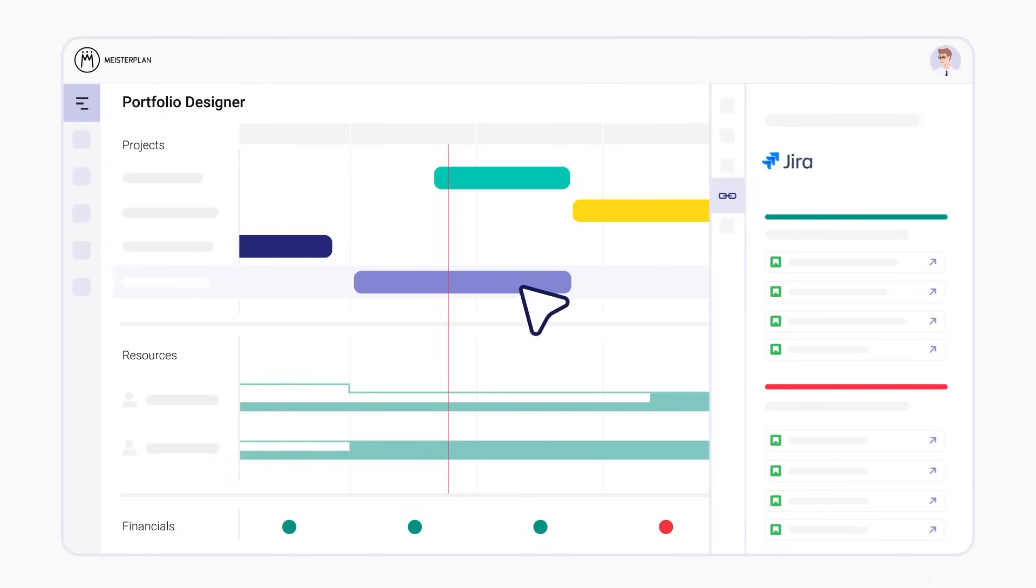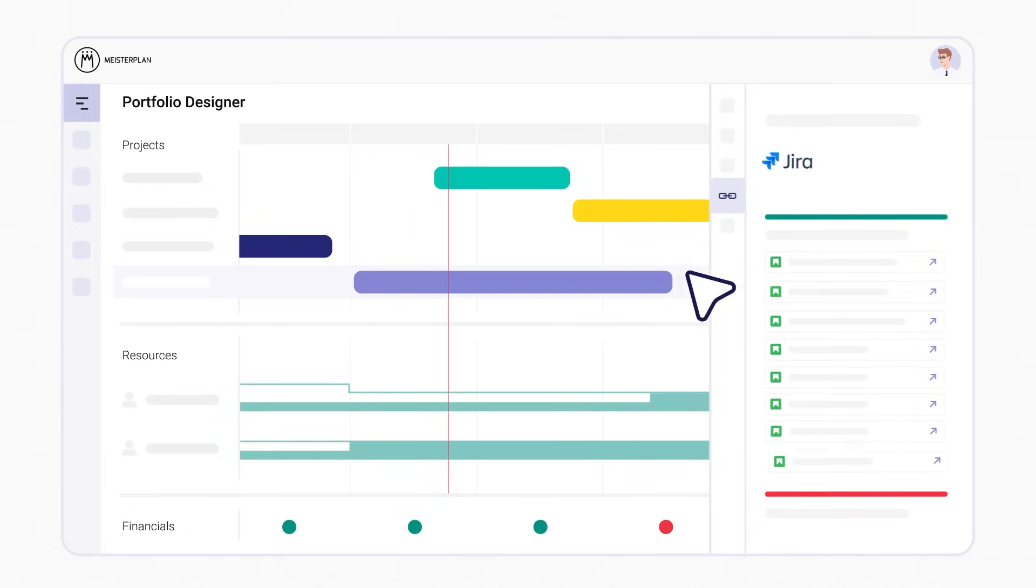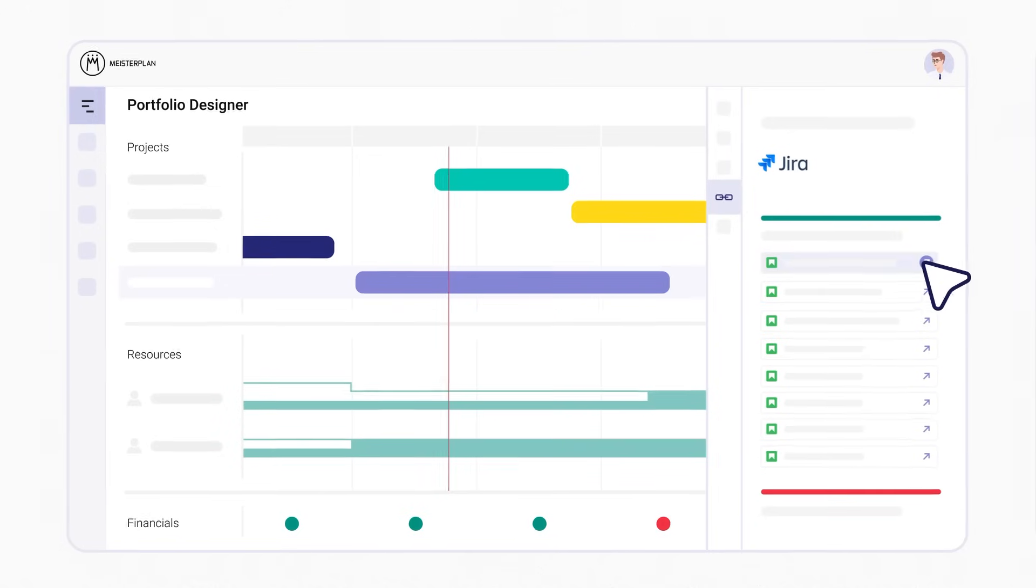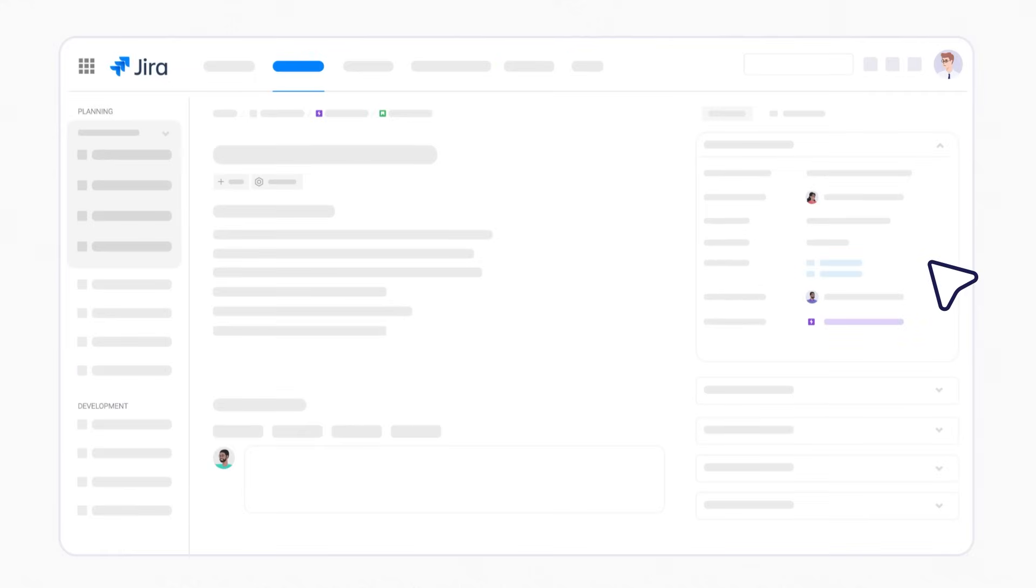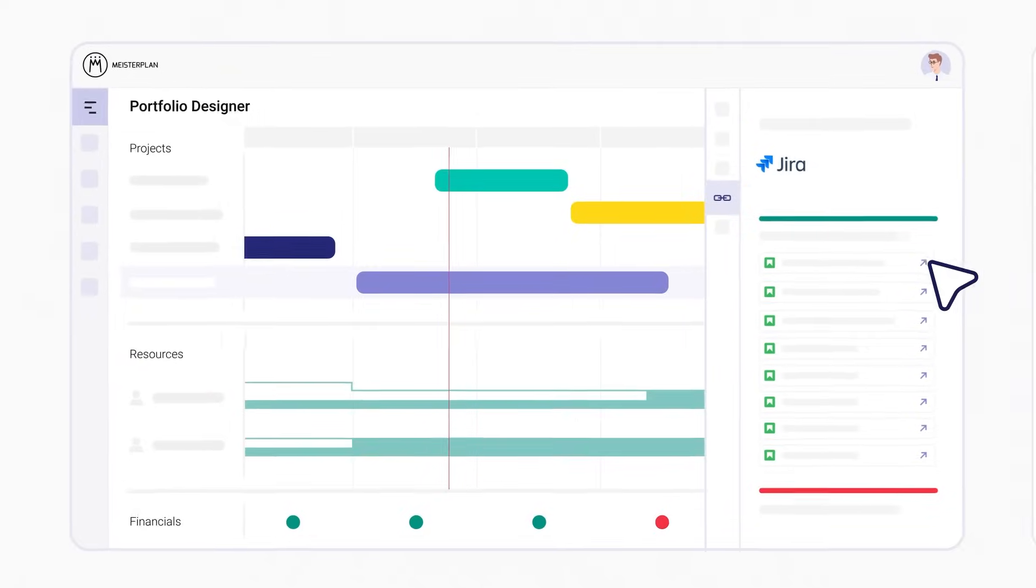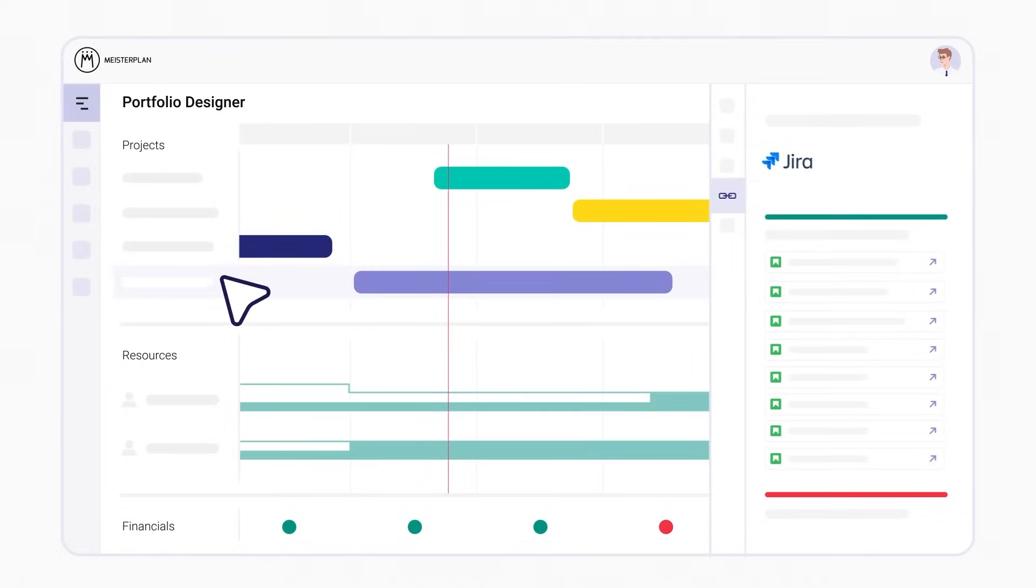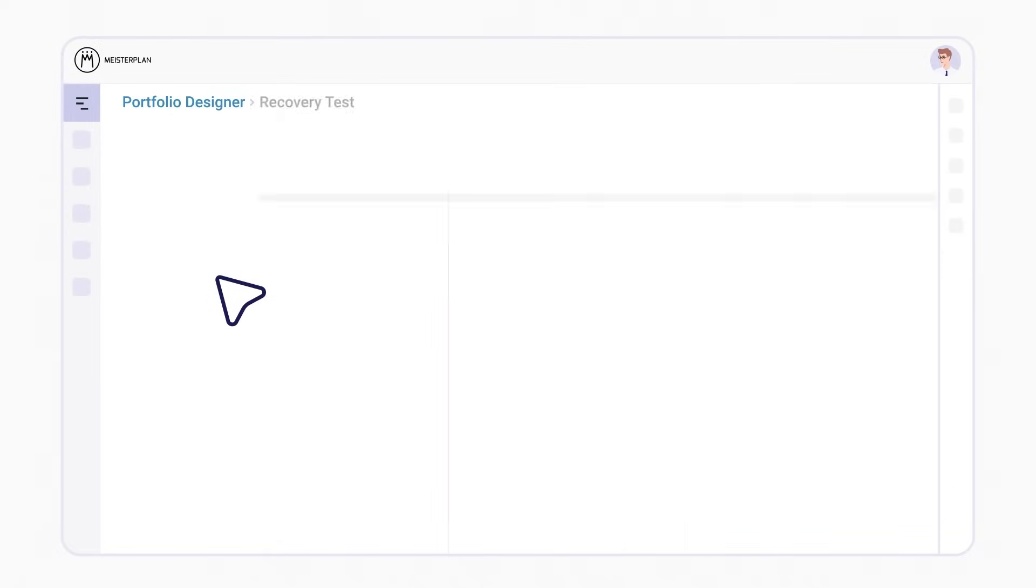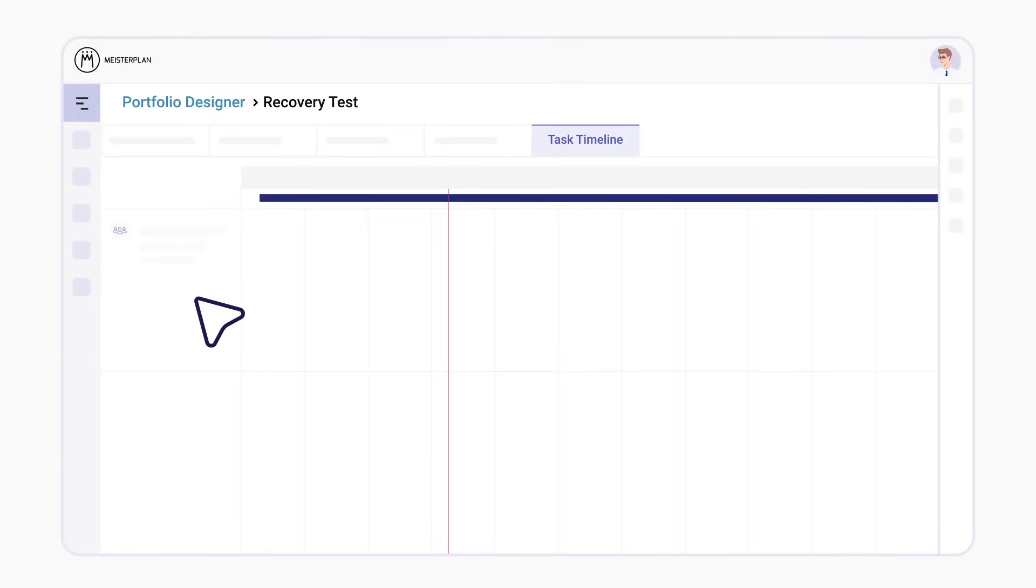Want to resolve any resource bottlenecks? Give your teams more time by extending the project in Meisterplan, or jump to your JIRA instance and adjust the scope or estimations.